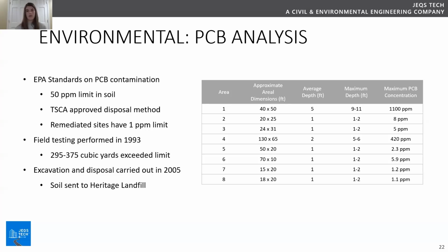We have this table on the right, which was just approximations of the area and depth of the areas that were excavated and sent to the Heritage Landfill, which is in Indiana, and is Toxic Substances Control Act approved. So the excavation done in 2004-5 met all the standards set by the EPA, so the site should be ready to go for construction of a new building.